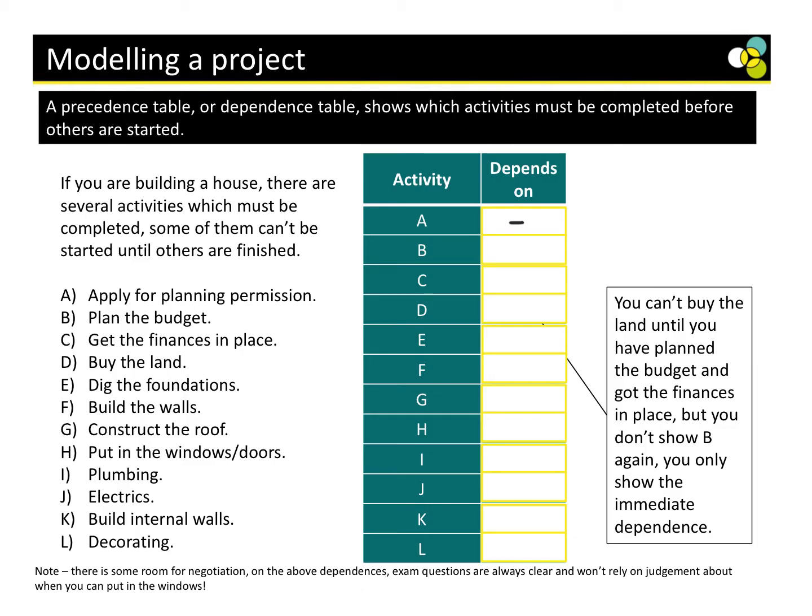Okay? Planning the budget. Does planning the budget depend on anything? What does it depend on? Getting the finances in place. So this is where there is room for speculation. Here, the finances aren't in place. What this means is that once they've planned the budget, they put the finances in place. So in this context, planning the budget doesn't depend on anything. Getting the finances in place does depend on the budget. So this depends on B.